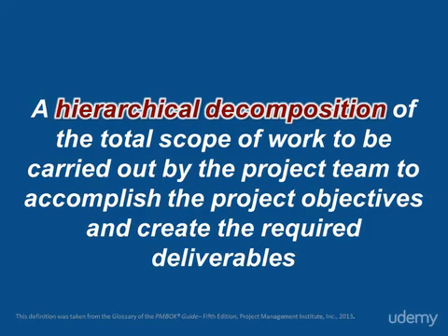And of course, the two key words from this definition here are decomposition and hierarchical. So, as we break down the scope of work, we decompose it into more manageable packages of work. Well, they're actually called work packages.